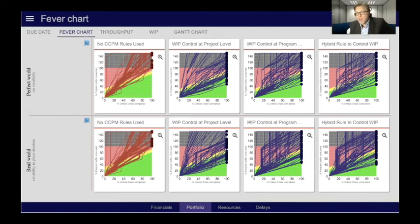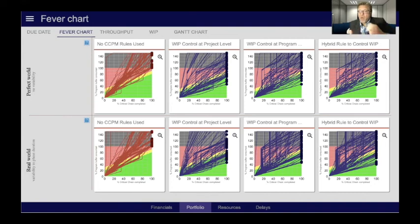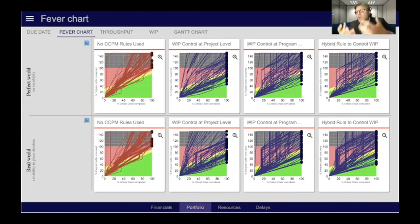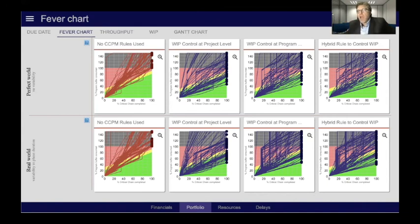In round one, no programs finished on time. In rounds two, three, and four, a number of programs finished on time. Some were finished late, but that's where you can become clever and say: let's make sure that we prioritize based on those programs that have penalties for late completion or bonuses for early completion — put those first and make sure those are delivered on time. Those which might not necessarily have penalties for late completion or bonuses for early completion — if you have to be late on some programs, those would be okay to slip.